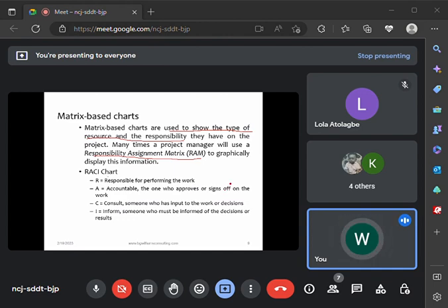Then you also have the second category, which is RACI, the RACI chart. The RACI chart shows. All right, now take note. Excuse me, sir. What is the difference? Just quick, sharp contrast. Take note. The RACI chart is often used on a departmental basis. The RAM is used on an individual basis. All right, please take note of that sharp contrast.